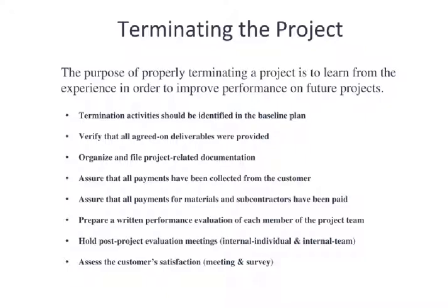You will also want to do an evaluation of the project itself. So this is often handled in terms of a meeting. You could do it yourself, but often it's best if you have other individuals involved. Basically a wrap-up, a sunset meeting, a post-project meeting, where you get everyone together for one last time and you document what went well, what did not go well, what could be done better next time, how can we improve.